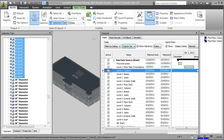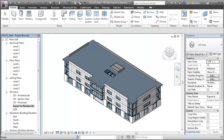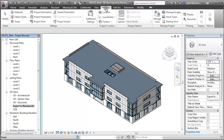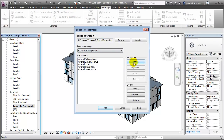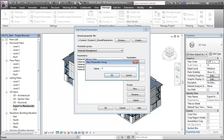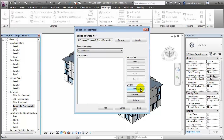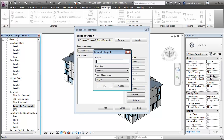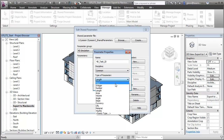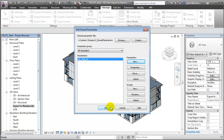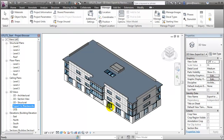Let's return to Revit and look at how we can add a parameter to handle that linking. To create a new parameter that we can use to link our building elements to construction tasks, let's start by creating a shared parameter. Switch to the Manage tab, open the Shared Parameters dialog, and let's create a new parameter group. We'll call this group 4D Simulation. Within that group, let's create a parameter — we'll call it 4D Task ID and it'll be of type Text. Say OK and OK to finish adding that as a shared parameter. The reason for adding it as a shared parameter is that we can use it consistently in many different project files and it can appear in schedules and tags.